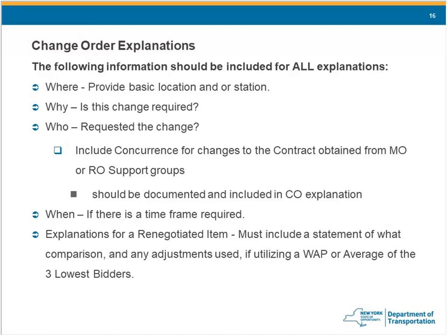So the general rule of thumb for when you need to get more detailed about a difference between your estimate and your actual is anything over 10%, you should be exploring why did this quantity increase that much? What was missed in the estimate? Or that's also, before you sit down to site manager, something you should have looked at, were our calculations accurate?